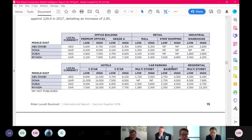So then you've said, well, it's going to be a high grade office, so we'll take the high version of premium offices, would you, at 7,000? So that's the sort of thing that you've done, is it? Absolutely. It was slightly different because retail is not exact in terms that they don't do what we describe as the ancillary retail. So we took a midpoint from that part of the index.